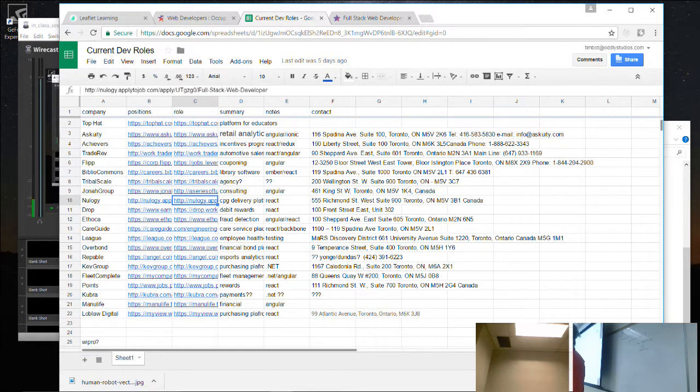Yes, although no. In a way, yes, because they do manage people by saying, here's your tests. So the end result of it is that you get what they call the backlog. It's all of the user stories that haven't been made yet. So the unit tester will take something from the backlog, make some tests for it, give it to the development team, who will then work on that, produce it. Once it passes the test, it gets added into the project, and then they'll move on to the next one.